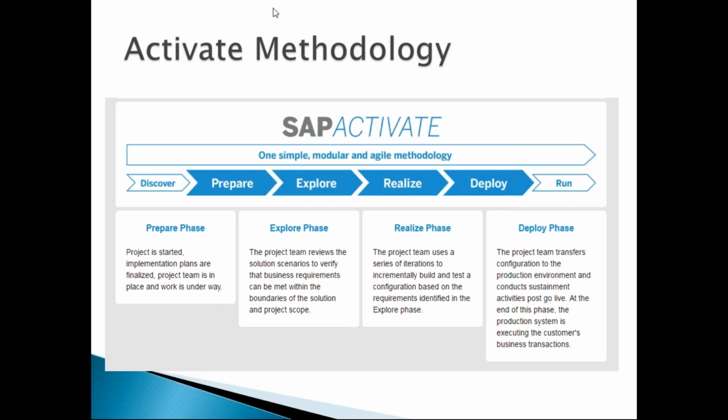And then after the 16th week is where we train the customer administrators, we start training on the product and we release it for testing. And after the testing, the production activities and all will happen in sequence. Okay, so that is where we have this kind of an approach.